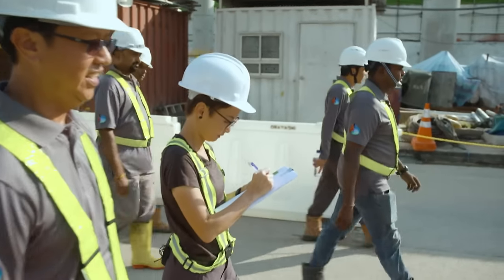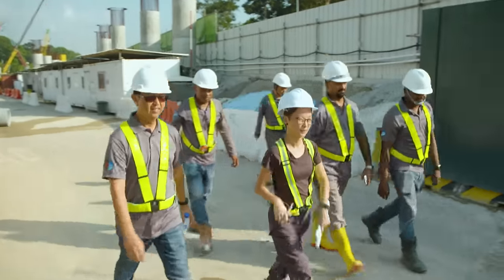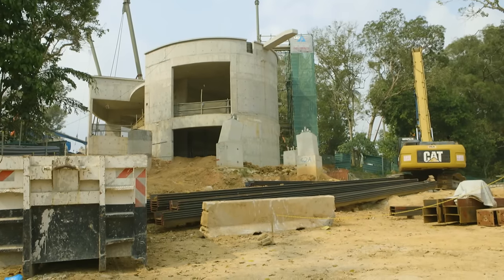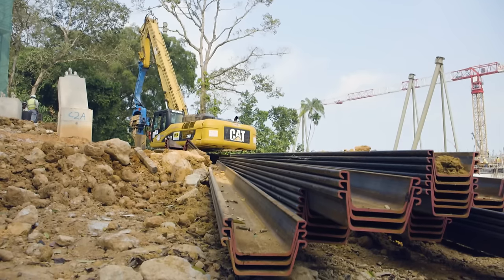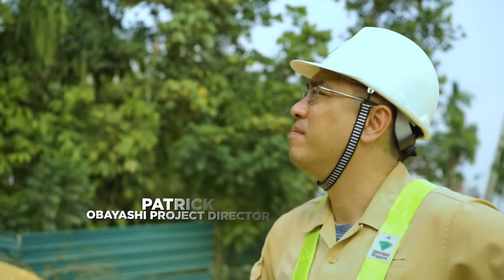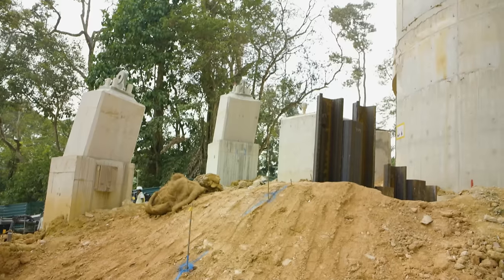Today's the 16th of July. The 16th of July was supposed to be the day that the first columns from the aviaries arrived. Due to the incomplete foundation work, the installation of the columns has been delayed. Alex is on site to resolve the issue of the sheet piles with Patrick. The sheet piles need to be finished before the columns.